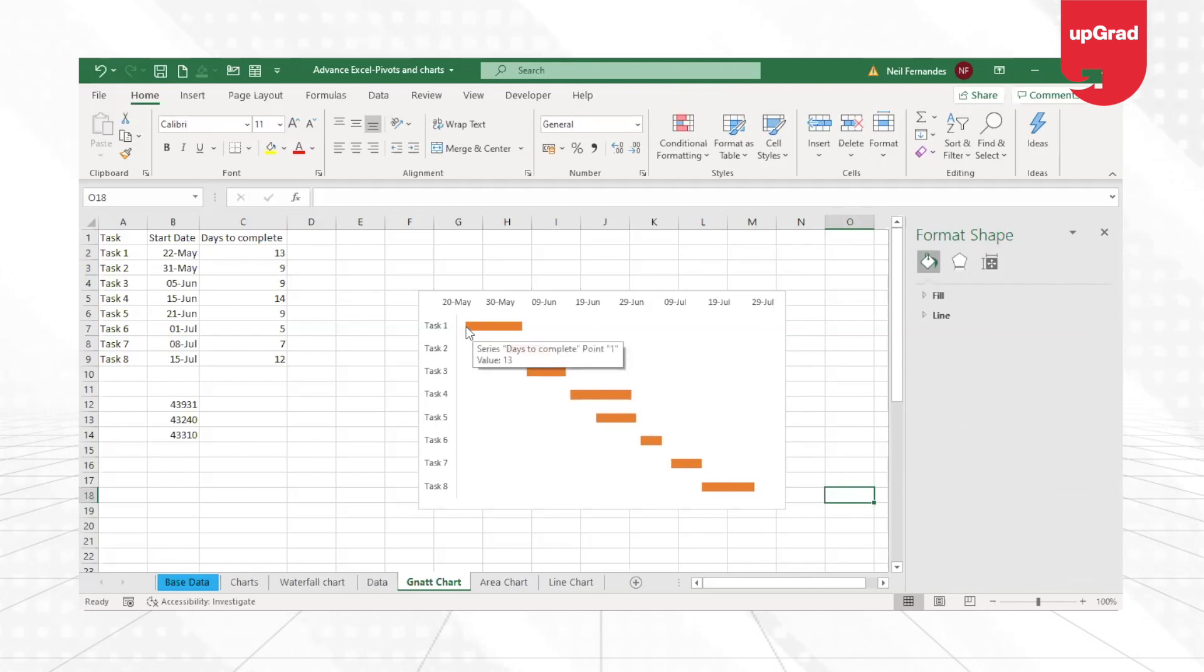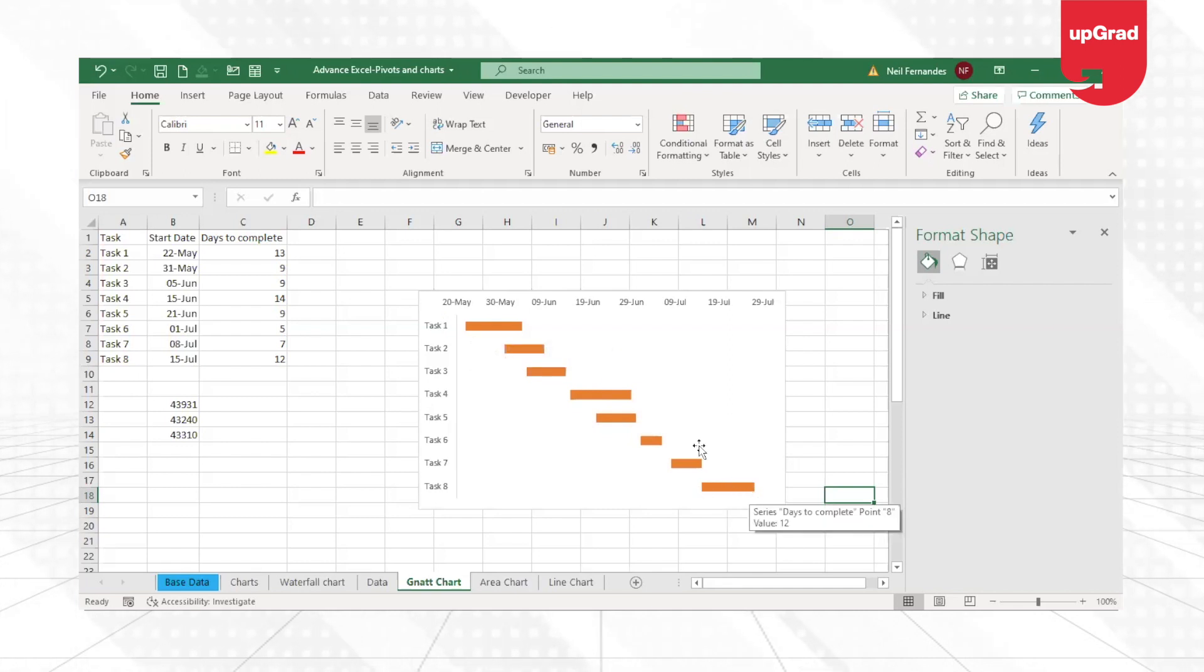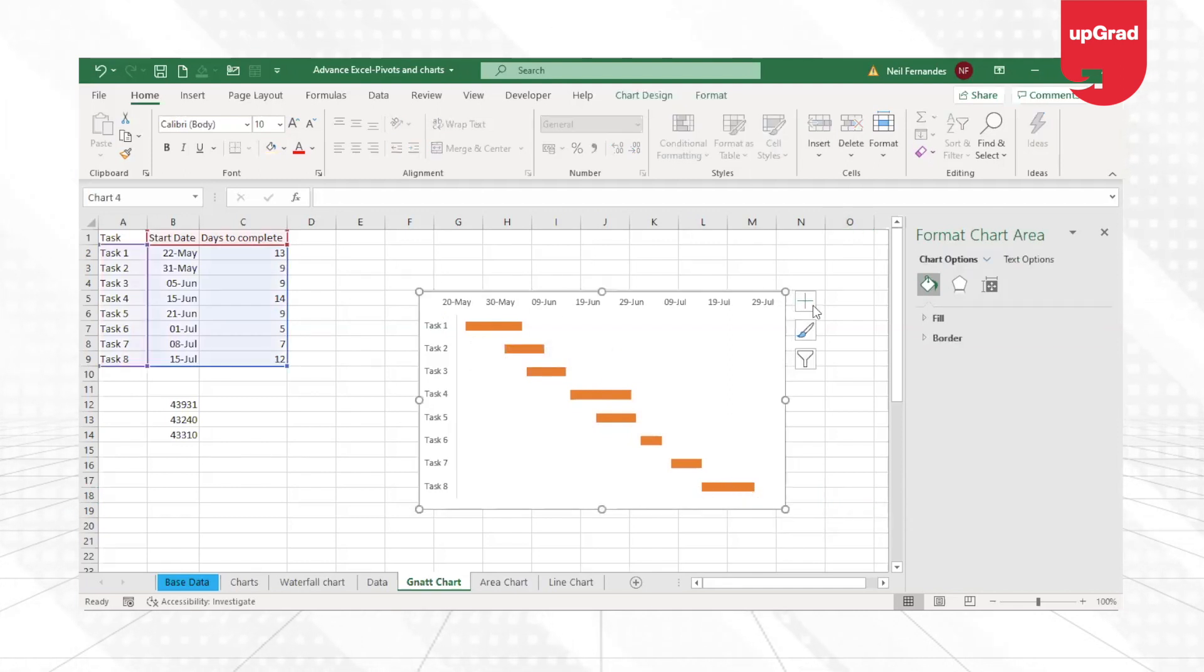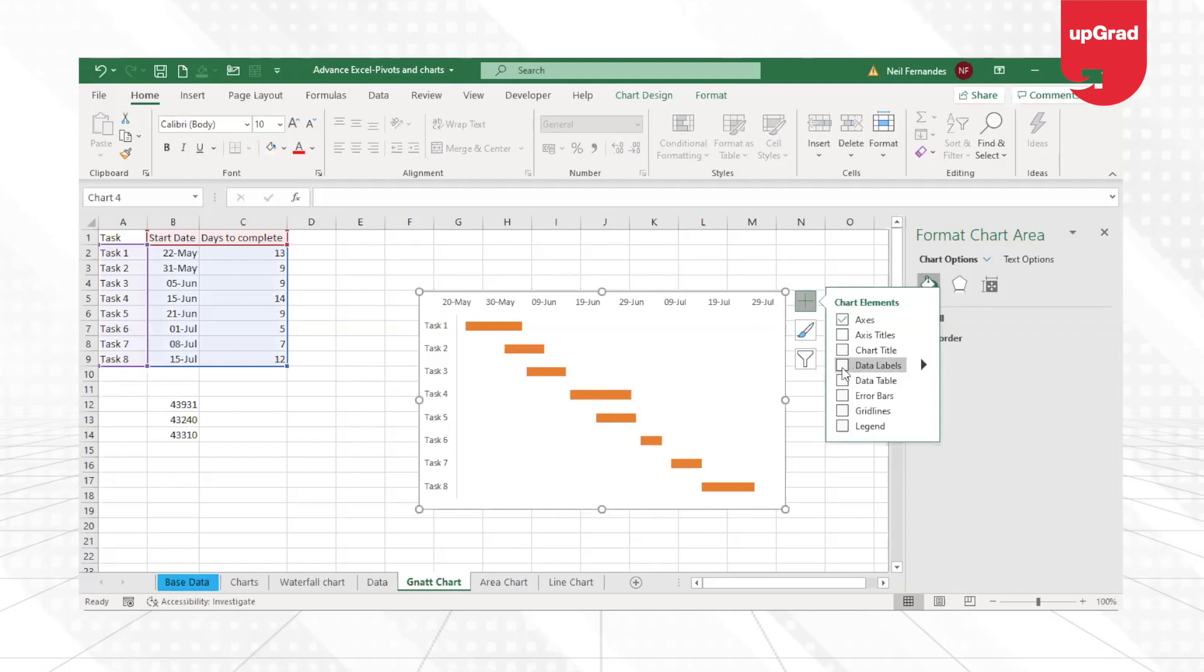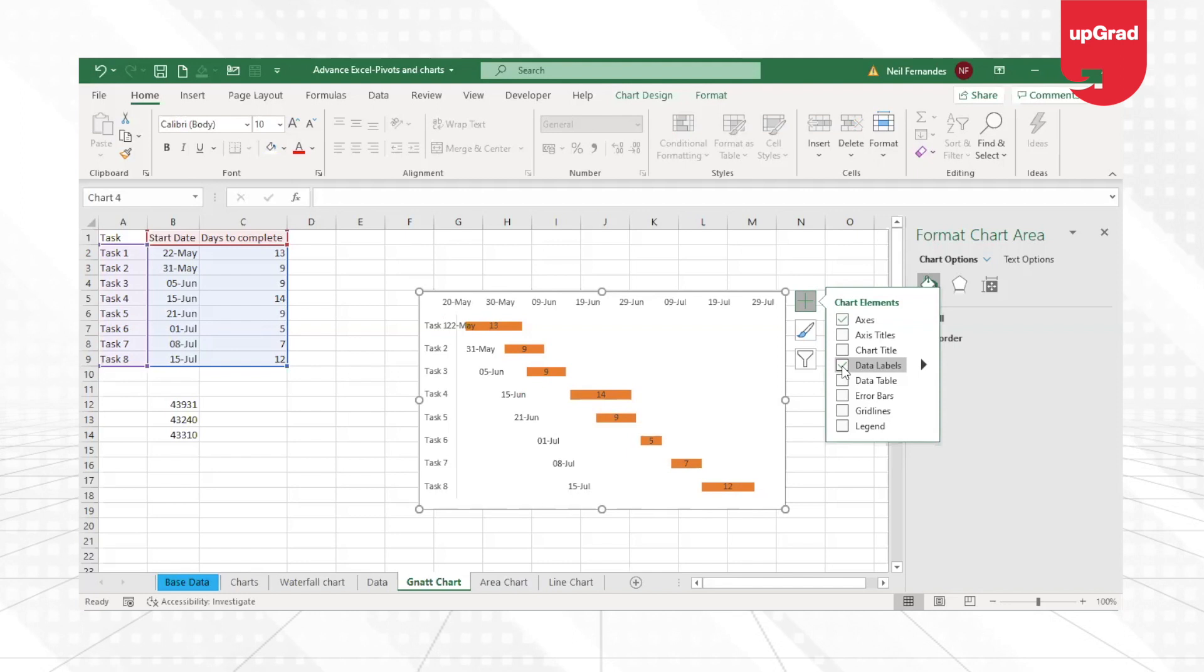Now you can clearly see that it is only going up to 29th of July and the data is starting from 22nd of May. Your project gets over on 29th of July. You can add your data labels if you want to.